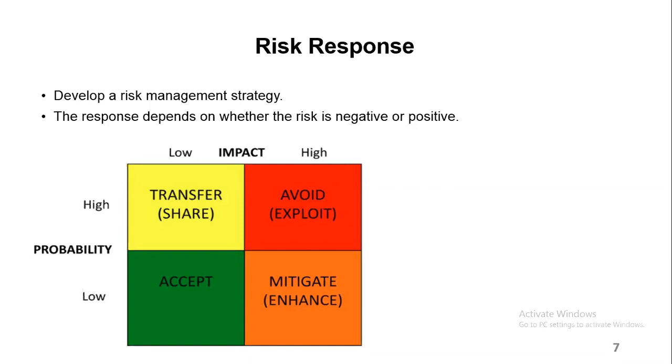So you can share that risk, because when you're exploring, there's a chance that you might find gold there and you might not. That's a risk by itself, and you're not willing to spend your money on it. So you can share that risk with another company and tell them, just explore, and we'll share the profit, or we'll share the deposit 50-50. Then they will take that risk and do the exploration. Like that, both of you are winning. It's a mutual benefit for both of you.